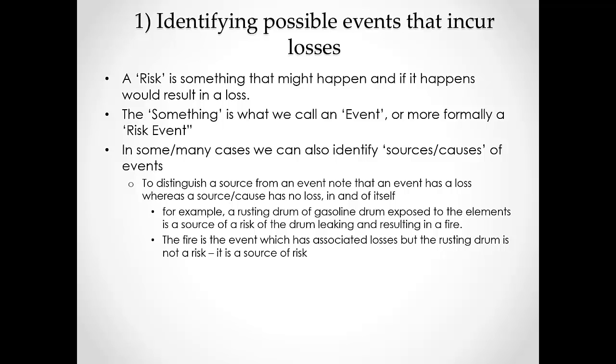First, a risk or risk event, or event for short, is something that might happen, and if it happens would result in a loss to one or more objectives. We can also identify sources or causes of the events. These sources or causes might also be referred to as hazards or threats. To distinguish a source from an event, we will emphasize that an event has a loss, whereas a source or cause has no loss in and of itself.